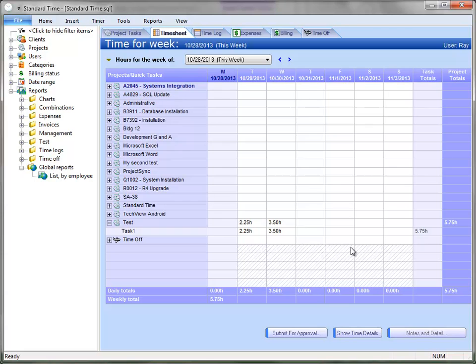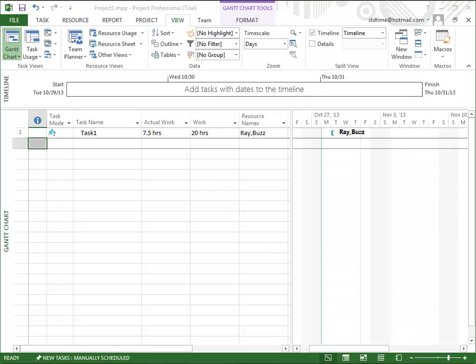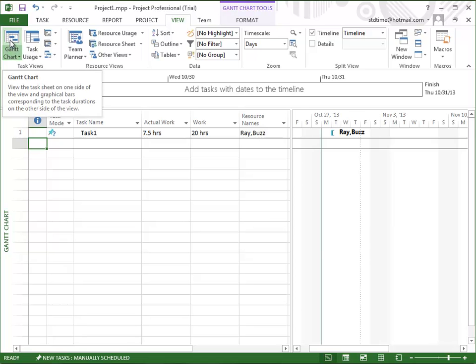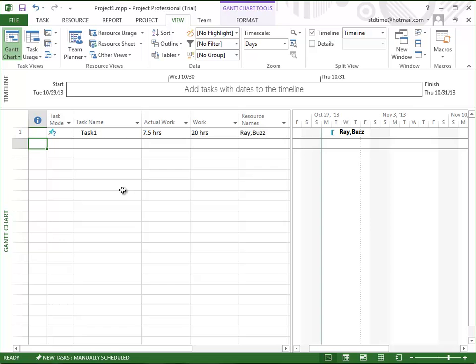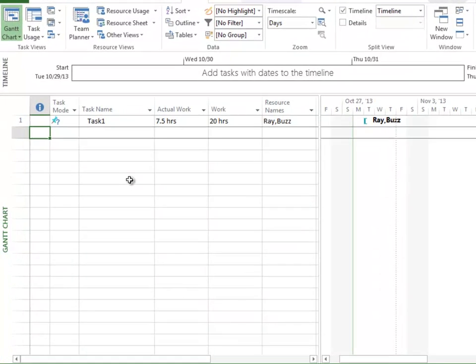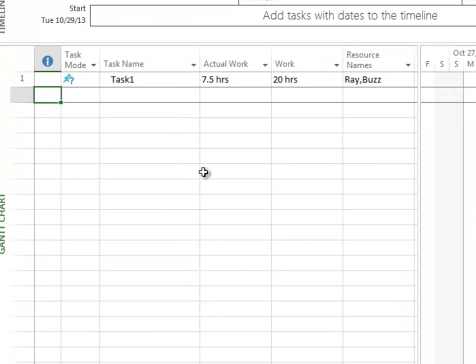So the first thing we're going to do is switch over to Microsoft Project and look at the MPP file that I have already integrated with. So I've opened up Microsoft Project and we're looking at the Gantt view. You can see by the icon here, and we're looking at this simple project that has one task. In this case, there are 20 hours of work. We have 7.5 hours of actual work that have come over from Standard Time.